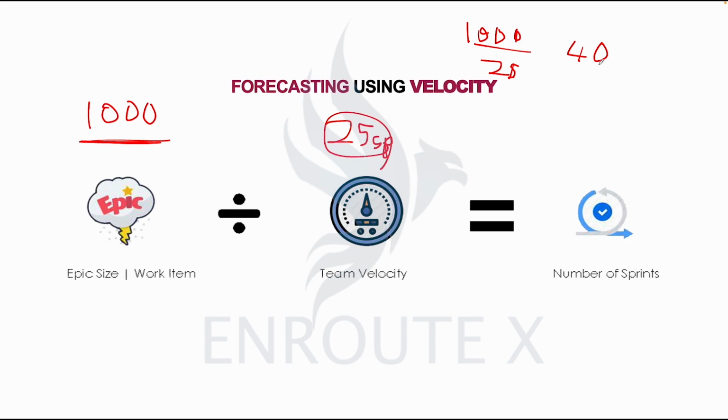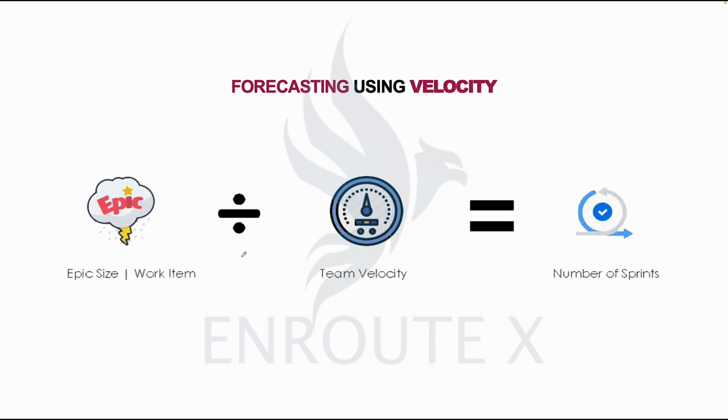or feature. So this is in a mild way how a product owner calculates how long it will take for a team to deliver a total story point. It could be for an epic, a feature, or the product itself. By dividing the total estimate by what the team has capacity to deliver sprint in, sprint out, it will give us the total number of sprints. The next slide quickly, and we'll stop there for this class.